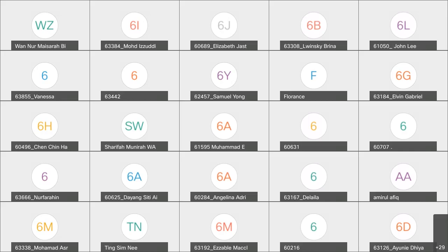So you all are giving us a lot of tables, even worse, a lot of numbers, but people don't understand the numbers. And yes, S-curve, of course you need to do your S-curve, okay? With your costing work, you need to do an S-curve. That is a financial S-curve. This is how you're going to plan your financials. After you've done your calculation, you should know how much you're going to be spending monthly. And yeah, produce an S-curve. That's easy. That is part of the work, okay?